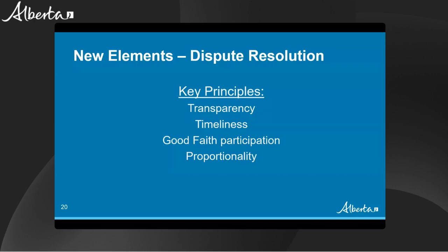The new DRP supports earlier and fairer resolution by requiring all parties to quickly and efficiently define the dispute, gather their evidence, and disclose the particulars of their position to the other party. This allows the other party to fairly consider or reconsider its own position before formal dispute resolution steps proceed, and the parties begin spending important resources.